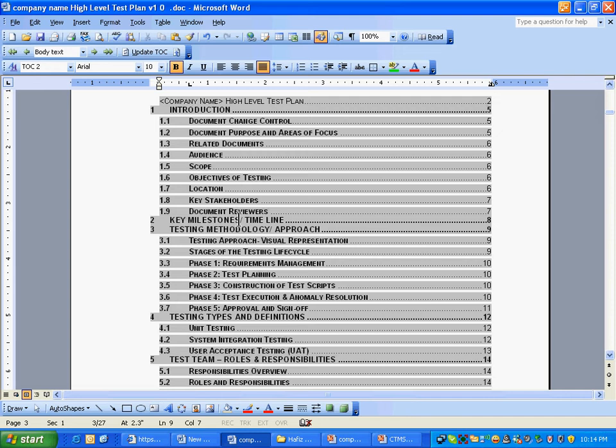I'm going to test the requirements. But at the same time, you may be testing more than the requirements. For example, there are certain things in Siebel which are out of the box functionality that may not be written in the requirement, like search functions, find function, query function. So he's going to write that, okay, I'm going to test each and every requirement documented in that XYZ document, exact name he has to give, lying at this folder, this is a link. This is the way I will write scope. Second, I'll also test some of the out of the box features like find and query, just to see whether they are working appropriately or not.